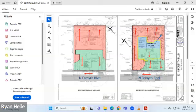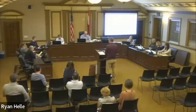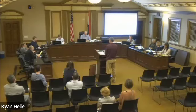Well, we do have a staff recommendation to approve as submitted. However, Stephanie, were you making some additions to it? I think that based on the discussion, the motion would be to approve with the following condition. Applicant shall install a rain garden or similar feature at the base of the driveway, which is designed to hold water even temporarily and to slow the drainage of storm water to the properties at the rear. Such feature shall be approved in advance by staff.